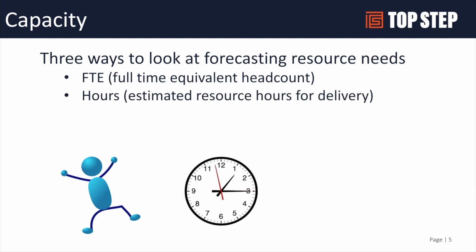Layering on top of FTEs, you have to layer on how many available hours those FTEs have for delivering work for my customers. So that would factor in vacations, holidays, downtime that you may have. Those are all part of the calculation to define hours in addition to FTE.